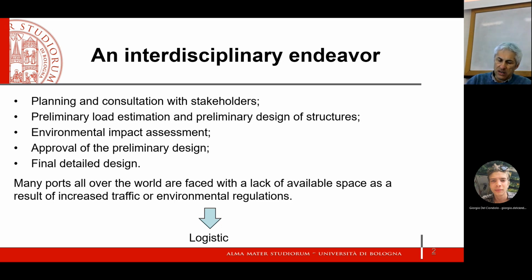Usually the way the design process is articulated in Italy is precisely through a preliminary design, which allows us to determine the essential features of the project. These essential features allow us to make a cost estimate, a first cost estimate.